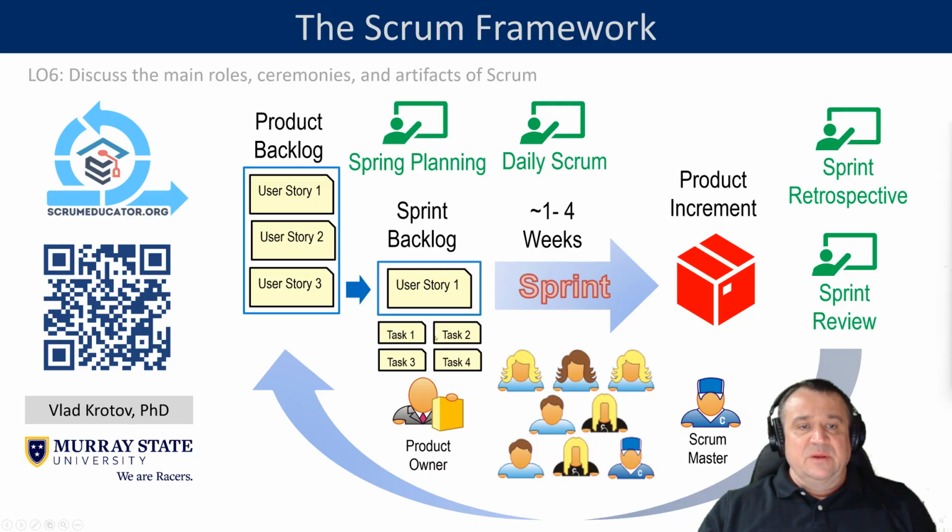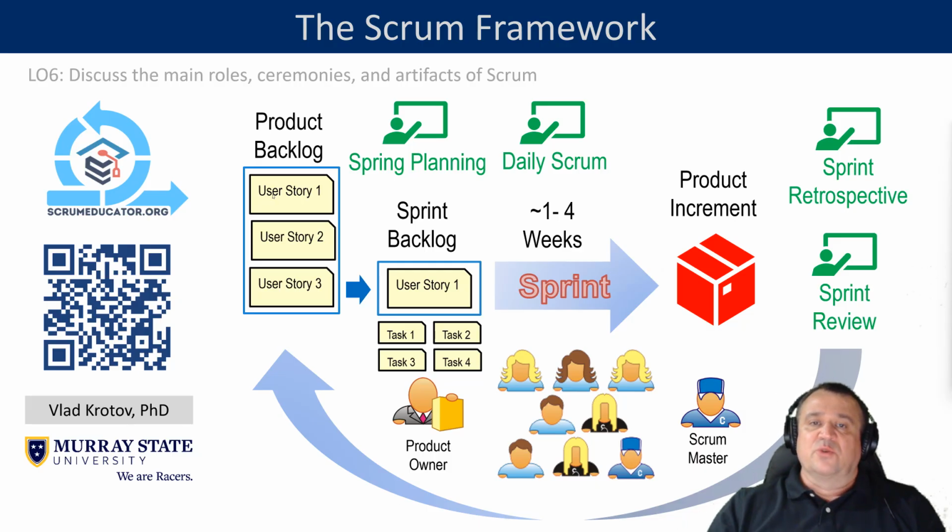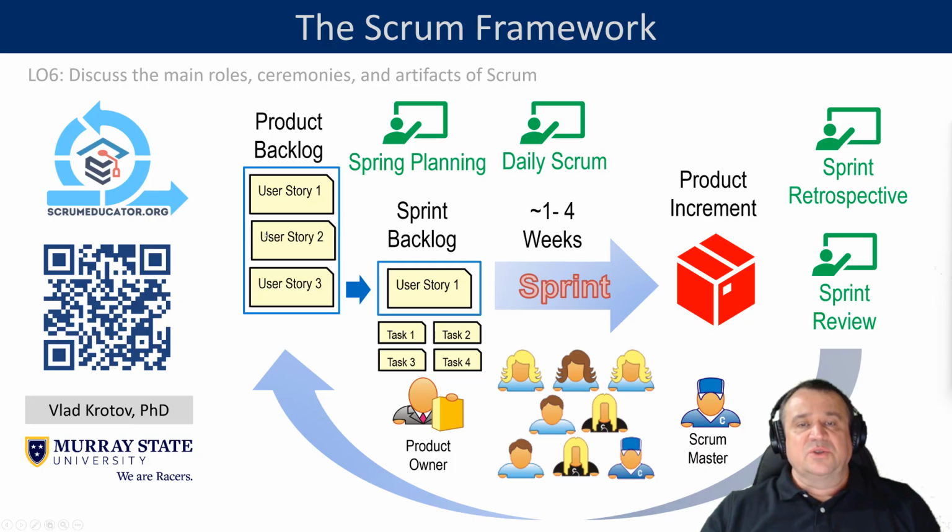Once you form your team, you take your project, meaning the product that you're trying to deliver, and you break it down into smaller items called user stories. Now, those user stories, you can think of them as user requirements towards the final product. And those user stories are often phrased from a user perspective. For example, as a user of a travel website, I would like to be able to view pictures of the hotels that I'm booking, right? So that will be your user story one.